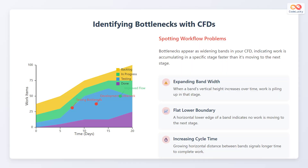Let's learn how to identify bottlenecks using cumulative flow diagrams. Bottlenecks appear as widening bands in your CFD, indicating work is accumulating in a specific stage faster than it's moving to the next stage. When a band's vertical height increases over time, work is piling up in that stage. A horizontal lower edge of a band indicates no work is moving to the next stage. Growing horizontal distance between bands signals longer time to complete work.